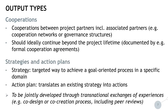For the next output type, we have strategies and action plans. A strategy is a targeted way to achieve a goal-oriented process in a specific domain. An action plan translates an existing strategy into actions. What is important here is that strategies and action plans need to be jointly developed through transnational exchanges of experiences. This can be done, for example, in a co-design and co-creation process, which can include, among others, peer review processes.